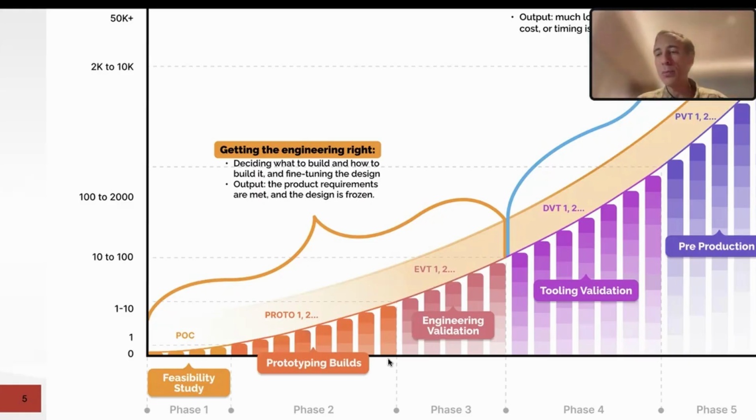The typical output is a plan for at least the next 2 phases, an initial risk analysis, and an initial plan for reliability and for compliance. These things very often are left aside, but it's good to start thinking about them.